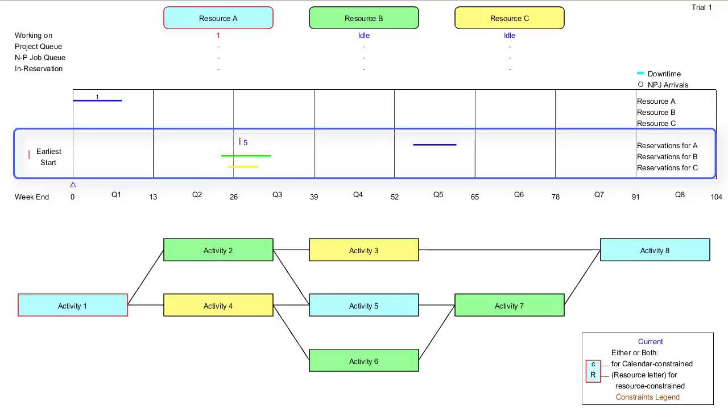Another project planning option is to set earliest activity starts. This will limit premature activity finishes, yet allow sufficient end-of-path buffers before merge points. An earliest start constraint is indicated by a vertical red bar on the resource line. Our plan is to not start Task 5 before 27 weeks into the project.